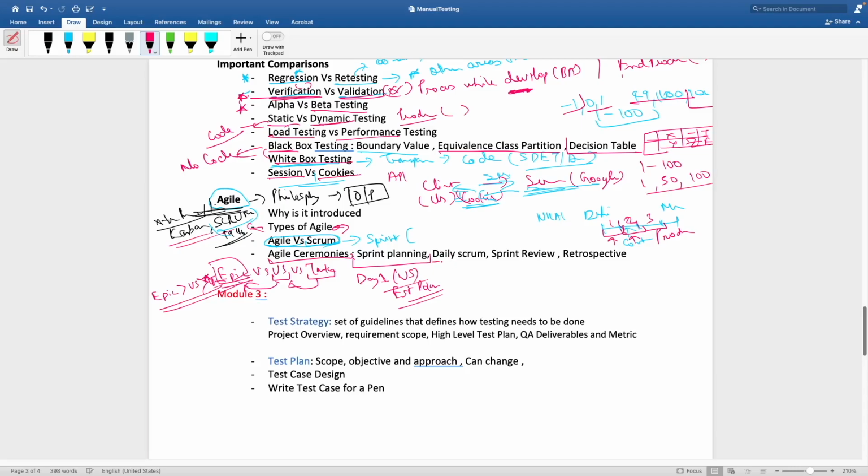Okay, then the daily scrum, which is also called stand up, in which we have to tell what I have completed since the last meeting, what I'm working on, and whether there is anything that I'm blocked on. Okay, so this is the daily scrum.